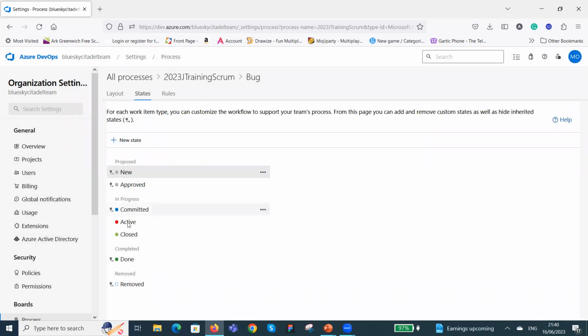So what we're saying there is, once the bug is live, if the developer is still working on it after the QA created it, fixing it, once it's fixed, the developer moves it to dev done, it's still active. The QA picks it from there, tests it, it is still active. And then once the QA tests it and everything is passing, everything is okay, the QA now can put it in their own QA done, and that is when we want it to change to closed.